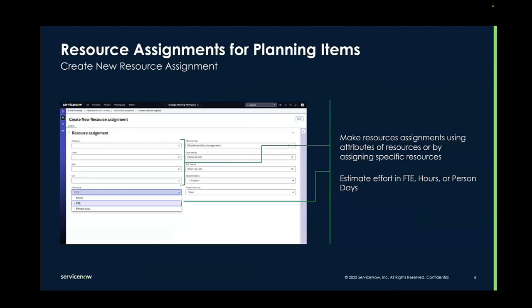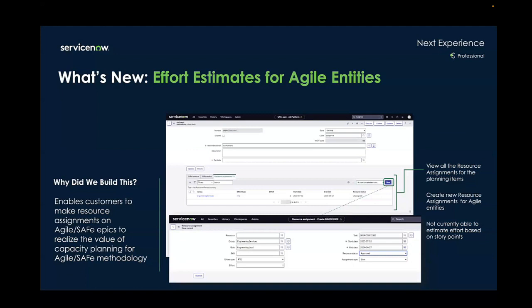Efforts can be estimated in terms of FTE, hours, or person days. And for pro users, effort estimates can also be made directly on agile entities like Safe Epics.